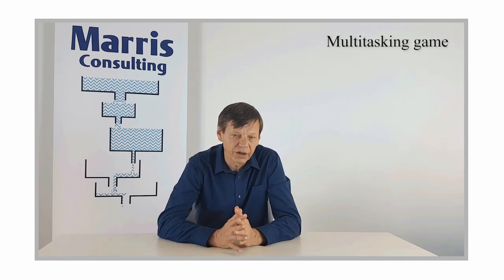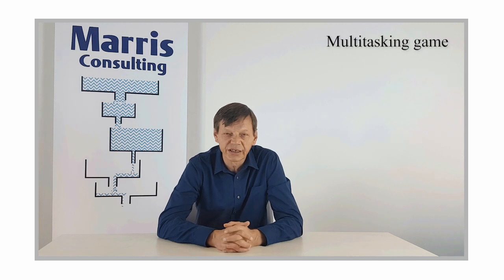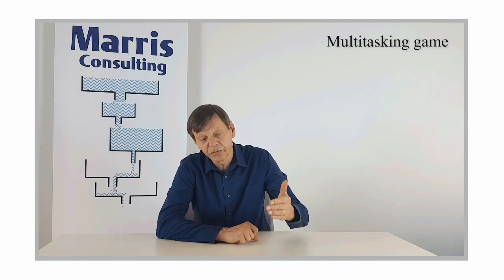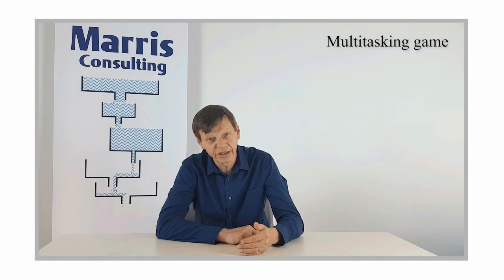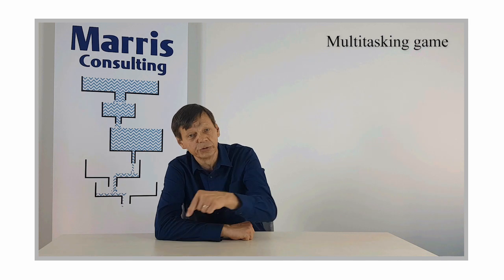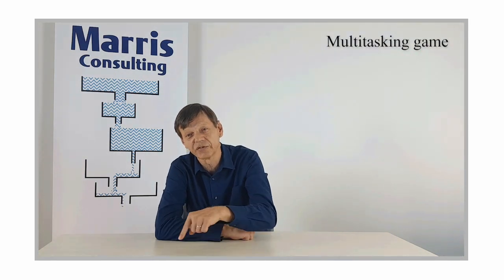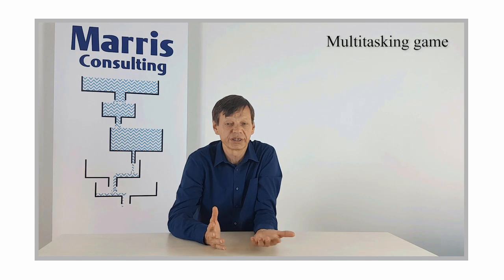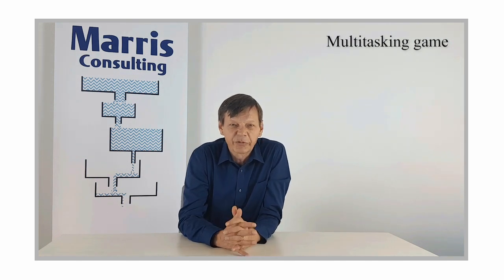Right, fine. And then we ask them to do it again in the multitasking mode. That's to say that they will first put the first of the even numbers, then the first letter of the alphabet, then the first of the odd numbers, then the first letter of critical chain, then back to the second even number, the second letter of the alphabet, and so forth. Just as simple as that, with obviously something that everybody should be capable of doing, right? The result is, in that simple game, that people take 3 times longer than they did with the same exercise. And more extraordinary, we find a lot of mistakes.